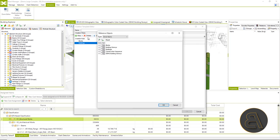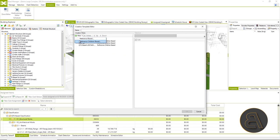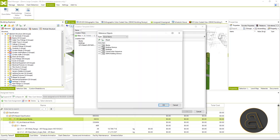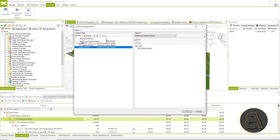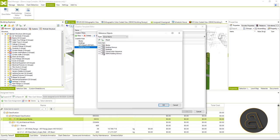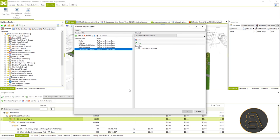As explained in the manual, in this example, the first level of division in the schedule is the blocks, then the buildings and the floors or levels, then the types of works, and finally the construction phase within each building.